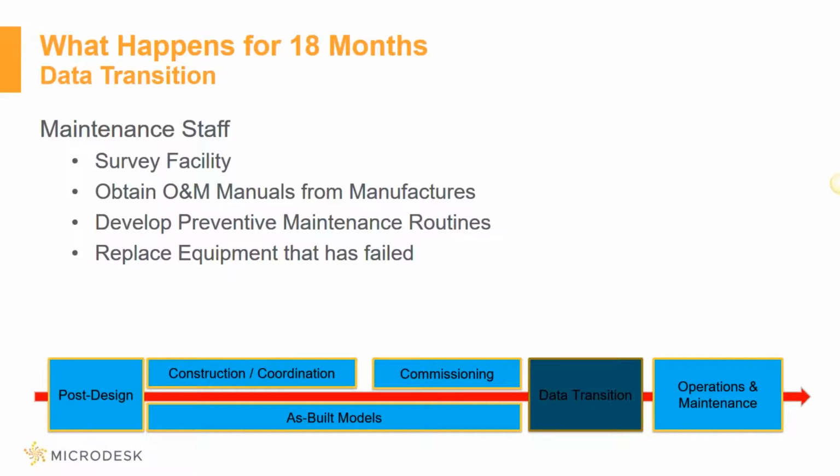So during the construction process, many organizations are very proactive, and they say, we want to have extended warranty on our critical pieces of equipment. However, the information about the warranty typically doesn't make it down to the operations staff, at least not for at least 18 months. And so when that piece of equipment fails,